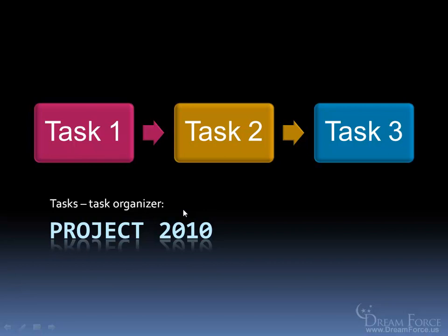A very basic and simple sample would be writing a book. For example, my first task would be to research the book, then next is to write the book, and then finally print the book. Now these tasks are linked up in a relationship, meaning I cannot start task 2 until its predecessor task 1 has been completed.